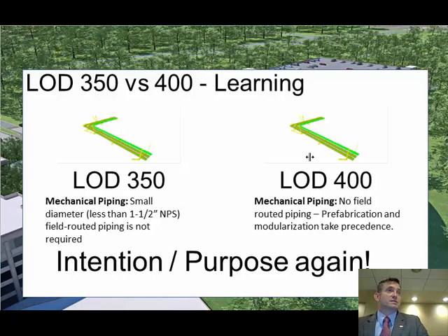Oh yes, existing. When you step into existing, you laser scan it all, right? If you laser scan it, that's your model, and you build everything inside of it. It is greatly more efficient for existing than even for new construction. We just went through that on a project in Memphis, Tennessee, with a over 100-year-old building that the owner very much wanted to look like a 100-year-old building when they were done, keeping the existing things in place.